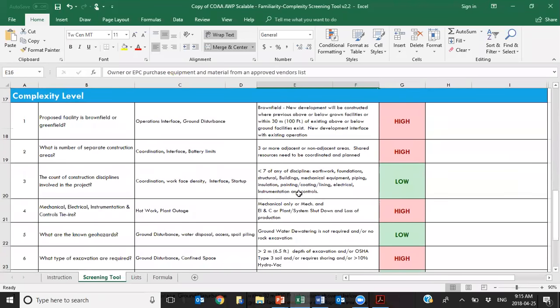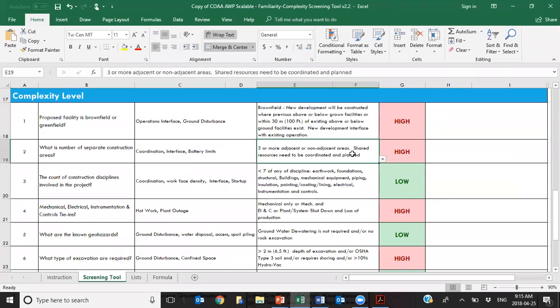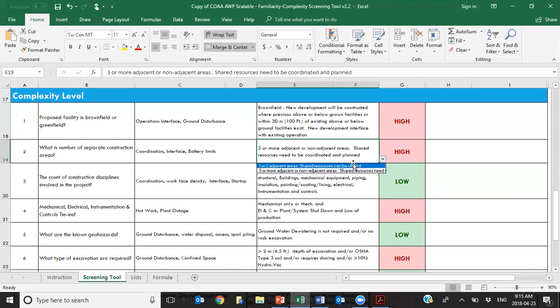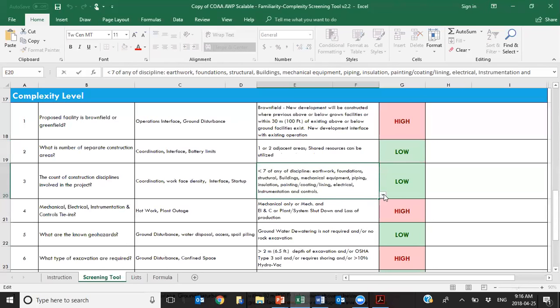When we go through and look at this particular project, it comes up green on the matrix — very familiar to us and very low risk. As soon as you've answered all the questions, it will automatically assess which quadrant the project falls into. The second dimension is the complexity type — for this brownfield project with only one or two construction areas, it falls as low complexity.